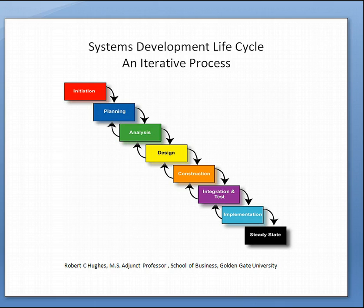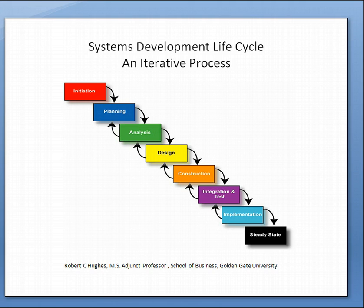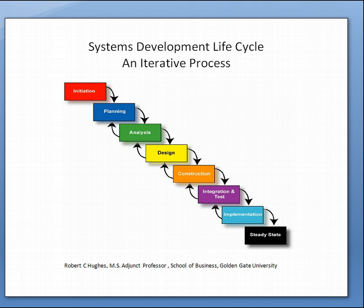Things can be missed, overlooked. There can be questions on scope. In later analysis and design modules of a systems development lifecycle, you may find that there have been things that come up which are necessary for the project. There may be a necessary add-on. You may have to loop back to further stages and if it's something that's a question in terms of scope, you may have to roll back all the way to the initial project plan.